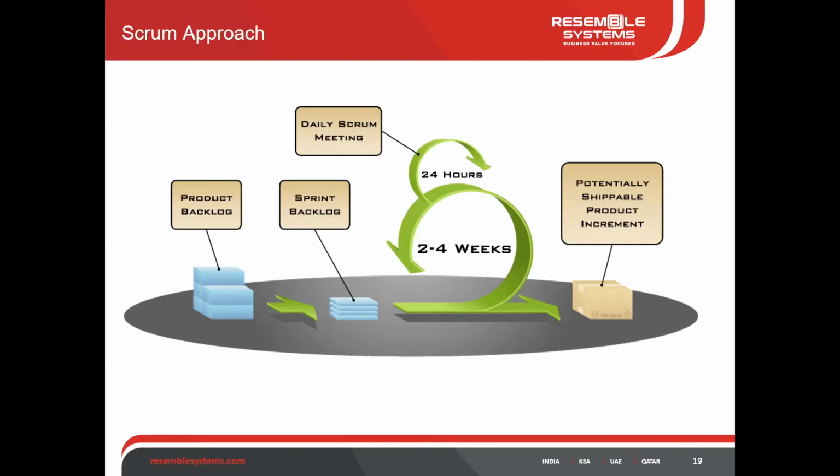So you can see the sprint backlog. So there I will put my actual requirements or actual features what I can execute, okay, through an iterative manner. So I may go with, okay, I need a login screen for the leave request. I need a form to apply for the leave. I need a mobile application. So that will be my deliverables in sprint 1. And I may deliver that within 2 to 4 weeks. And I can roll that out for the users. And in the next sprint, I can look into some other features. So I'll show you this during the demo part, how it's been created.